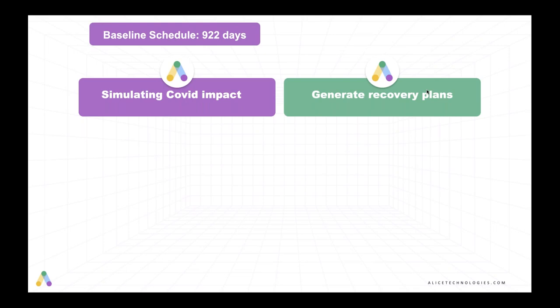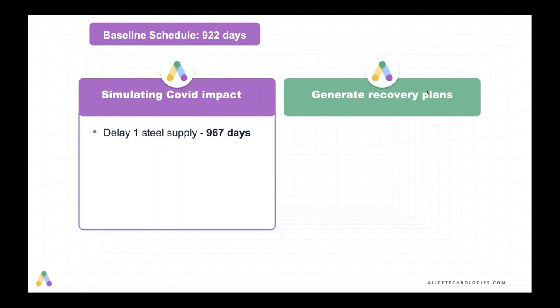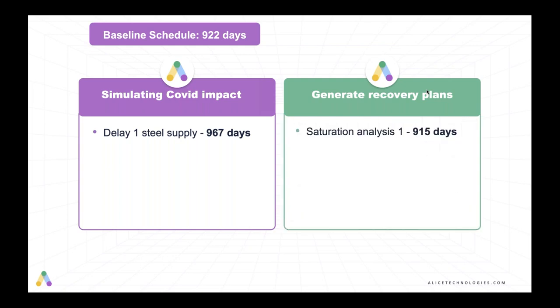This is what a resilient construction plan looks like. And then when they started work again, they actually had to deal with reduced workforce on the job site and reduced productivity due to social distancing. So then they needed to reevaluate their schedule again and run some simulations on how they could model the reductions in workforce and reductions in productivity due to social distancing. So going back to our framework of simulating the COVID impact and generating recovery plans. Remember, the baseline schedule was 922 days. When the delay in the procurement of steel hit, the project was delayed to 967 days.